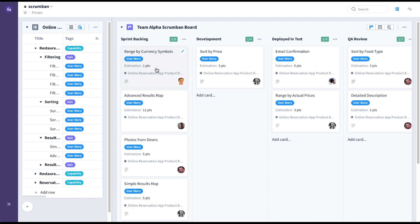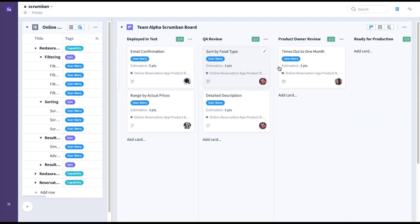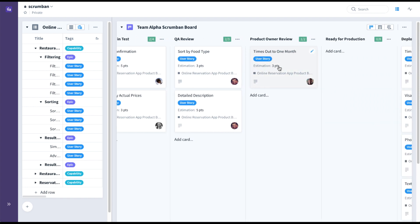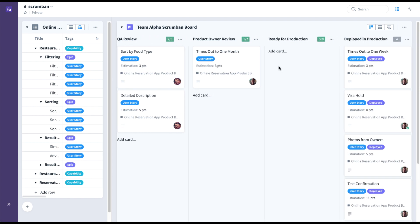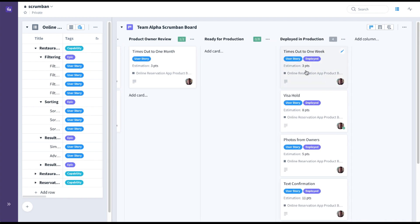So we have a sprint backlog. Remember this is Scrumban, not Kanban, and this would probably be filled during sprint planning. We have a development stage, deployed in test, QA review, product owner review, ready for production, and finally deployed in production.